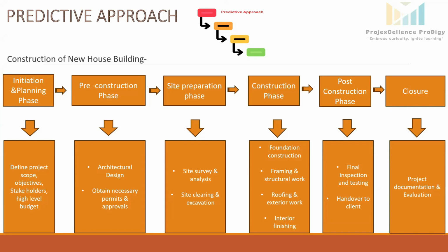If you notice here, every activity is in sequence. Once you are done with the foundation, only then can you raise the walls up. Once you have raised the walls, then you can do the roofing. And once you are done with all the exterior work, finally you come to the interior finishing work.